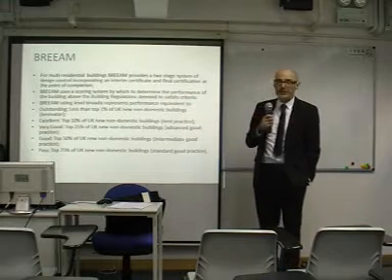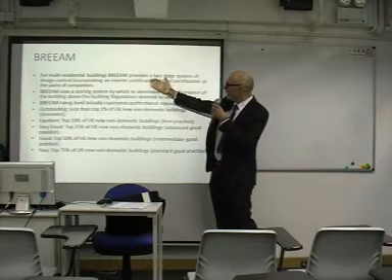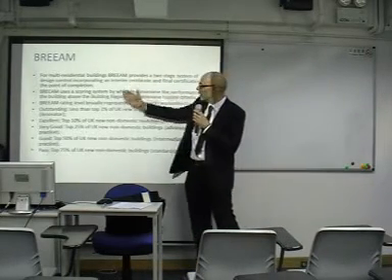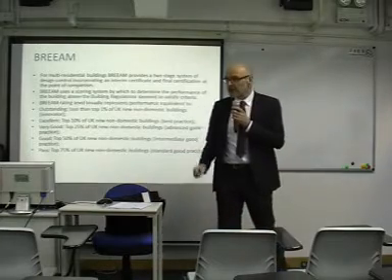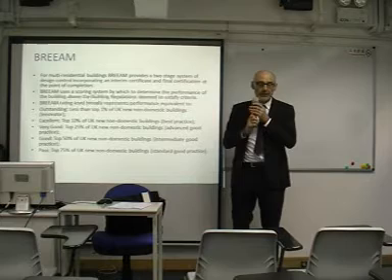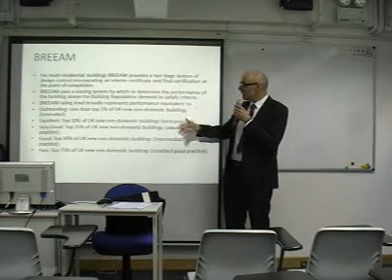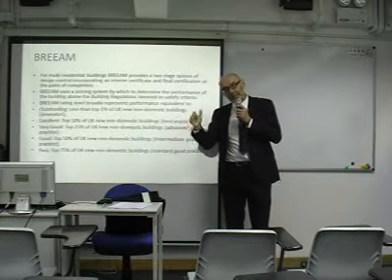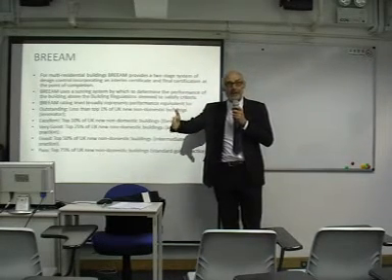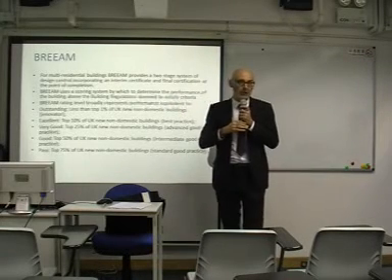And there are different systems, but for multi-residential buildings, BREEAM, like most of its other forms, is a two-stage system. First of all, it's a design control, and from design you get an interim certificate, and then you complete the building and you get a final certification at the point of completion when some of the final checks can be made. Actually, there are critics in the UK who say that at the point of handover of the building is not the end of the matter. It's how you use the building afterwards, which is where Living Building Challenge comes in.